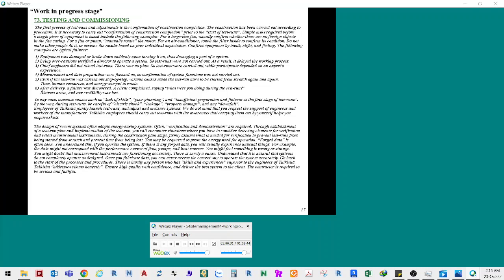5. Even if the test run was carried out step by step, various causes made the test run have to be started from scratch again and again. Time, human resources, and energy were put to waste. 6. After delivery, a failure was discovered. A client complained, saying, "What were you doing during the test run?" Distrust arose, and your credibility was lost. In any case, common causes are lack of skills, poor planning, and insufficient preparation, and failures occur at the first stage of test runs.